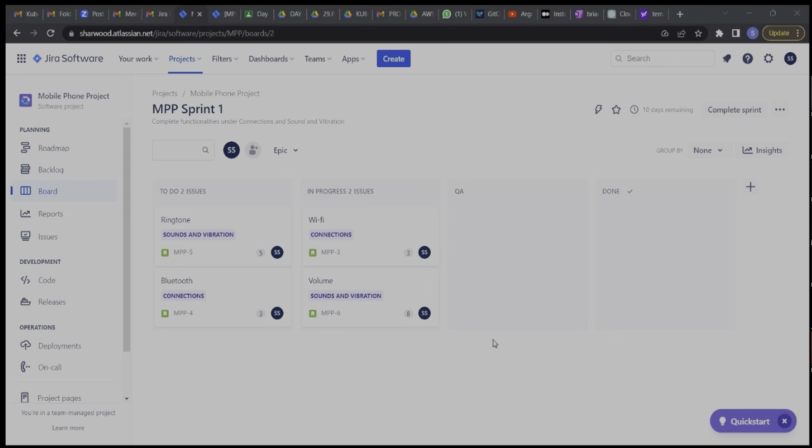Okay. All right. So as a Scrum Master now, she has given an impediment, right? She had an issue. So that is what she was working on yesterday. It's what she'll be working on today, but she has an issue. So as a Scrum Master, of course, you now have to follow up with her on that impediment, right? If the impediment does not concern the whole team, we don't want to keep the whole team waiting. So I can simply tell her, Kelly, can you stay back after this? Or can we take it to the parking lot so we can look at the impediment that you're facing, right?